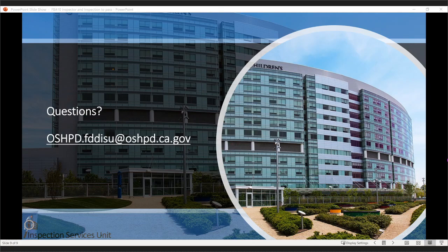And Tim, this is the DAC James Pong with ISU, and I also work in the field, and I have encountered the issue that you have described. And like Nikki said, your first level of interaction is the OSHPD field staff, so contact the field staff. Normally, we will have a meeting with the owner's rep, who is acting as the PM.